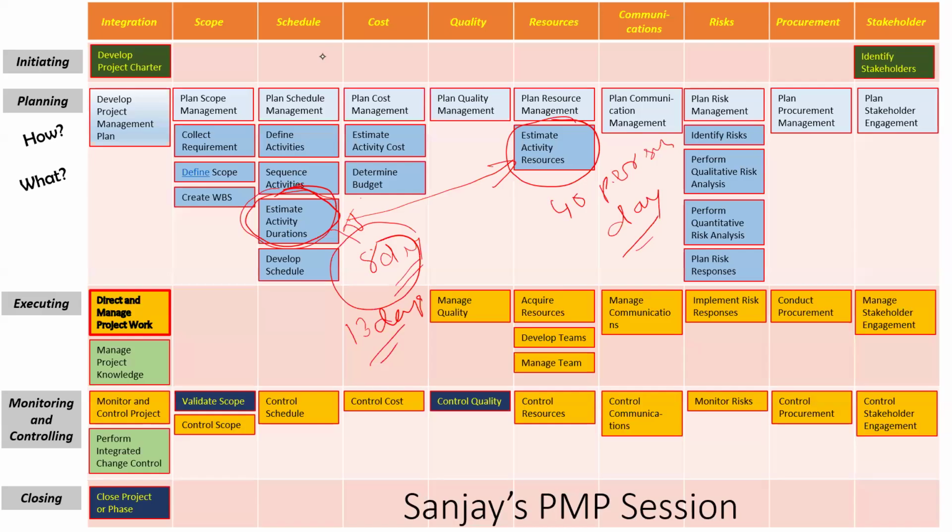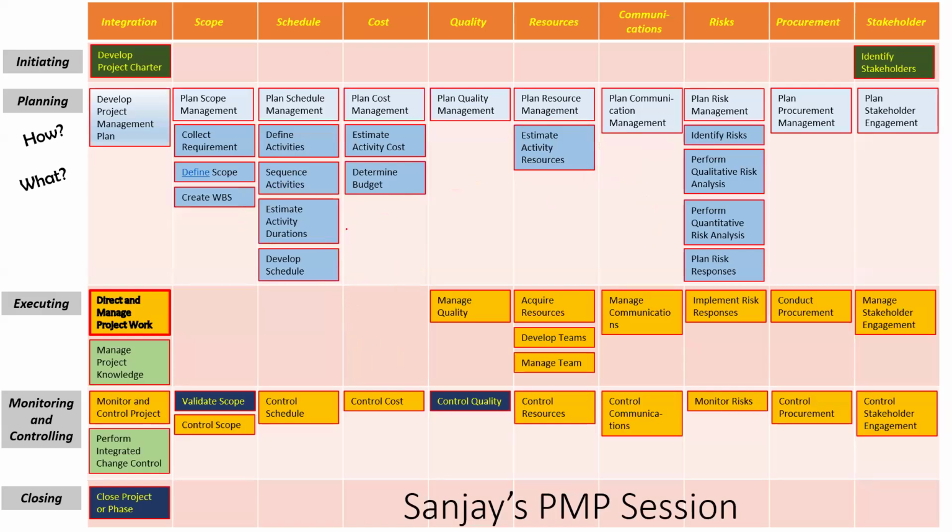Remember, friends, in the whole of the schema here, there are 3 places where estimates are done. This is the one we are learning: duration, how many days it takes. The second is how many resources are required. And here it is, how much total cost is required. All these 3 places you need to do an estimate.